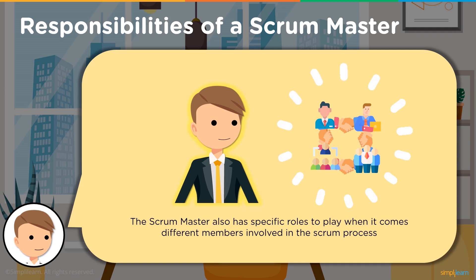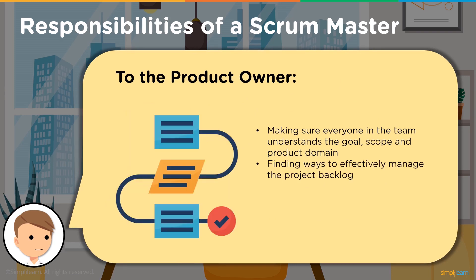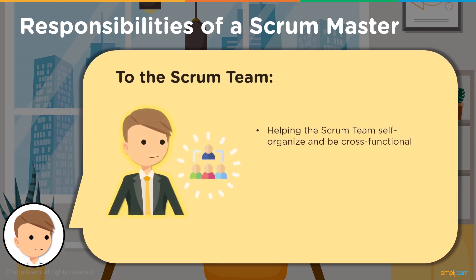Regarding responsibilities to the product owner: the Scrum Master makes sure the goals, scope, and product domain are understood by everyone on the team. The Scrum Master needs to find a way to effectively manage the product backlog, helping the Scrum team understand why it needs to be clear and concise. The Scrum Master also ensures the product backlog is arranged properly and facilitates Scrum events like sprint retrospectives, sprint planning sessions, and daily Scrum events.